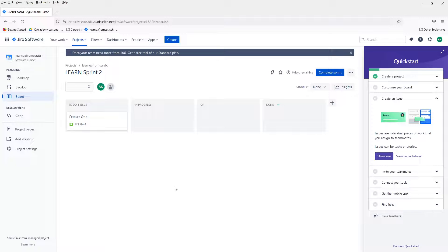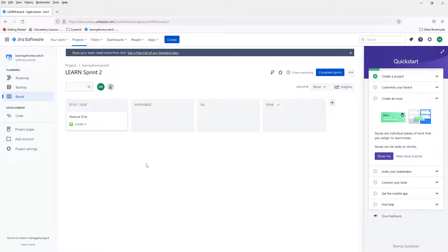I like Lean because when I was working with different agile frameworks and methodologies, one of the problems with sprints is that if you fail to deliver, your stories can overlap into the next sprint and the workload increases. The release date doesn't actually move, and by the end, closer to the release, there's this crazy amount of work overflowing from previous sprints — it was pretty hectic.